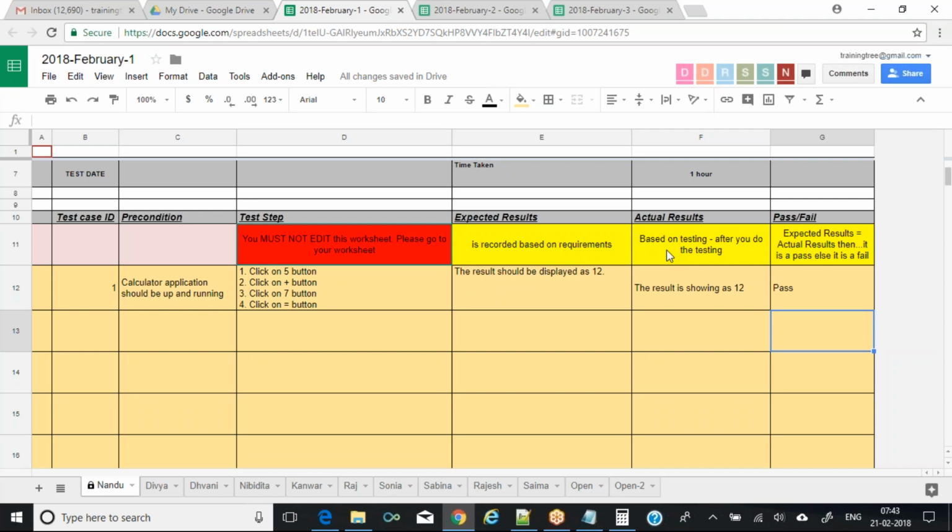One more thing, the test plan, you didn't explain that, right? Because there was a power cut in my house and I lost connection for 2 minutes. I have just given small information about it and then I moved to test case design. Normally it will be taken care of by the test lead in real time. He will be documenting information like what needs to be tested, how to be tested, when to be tested and who is going to test. That information will be documented under the test plan so that every team member is aware of the schedule and the scope of the testing activity. That is the only reason it is required.